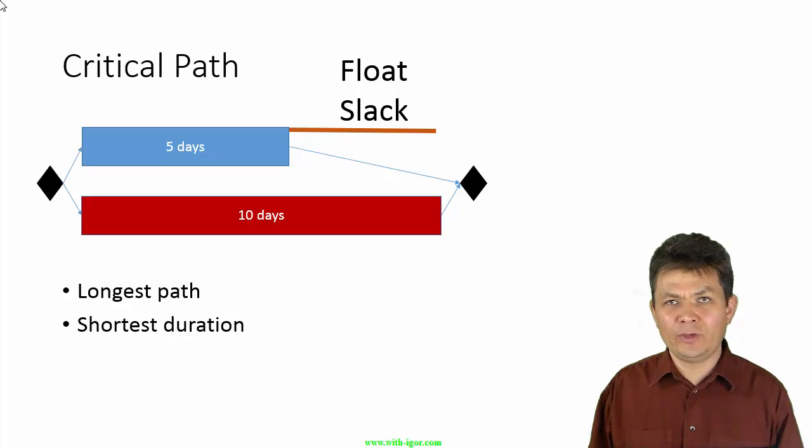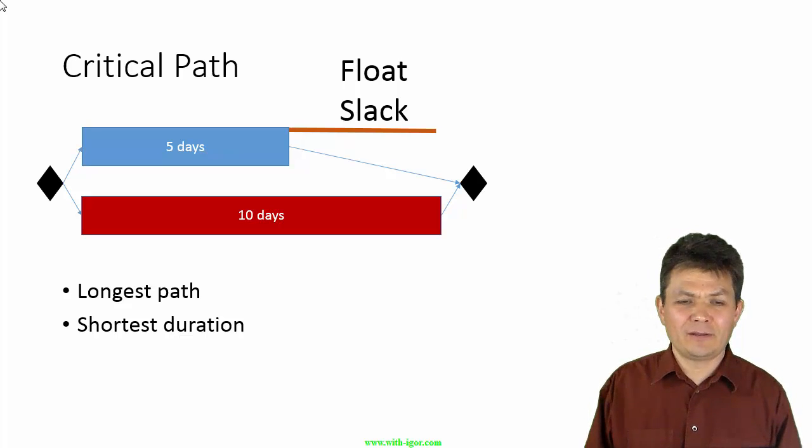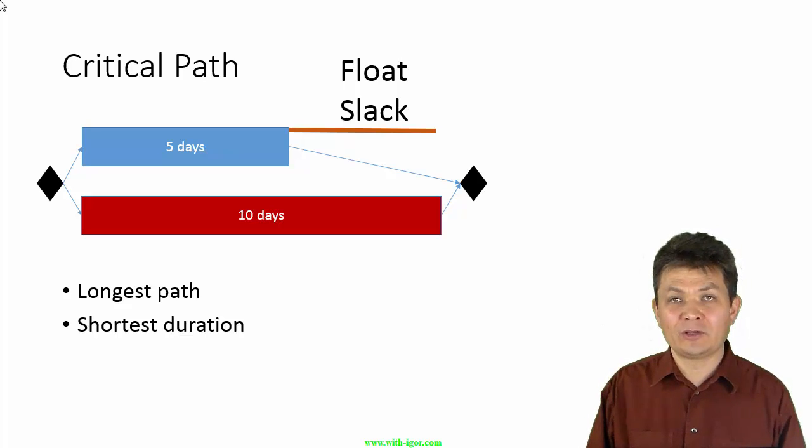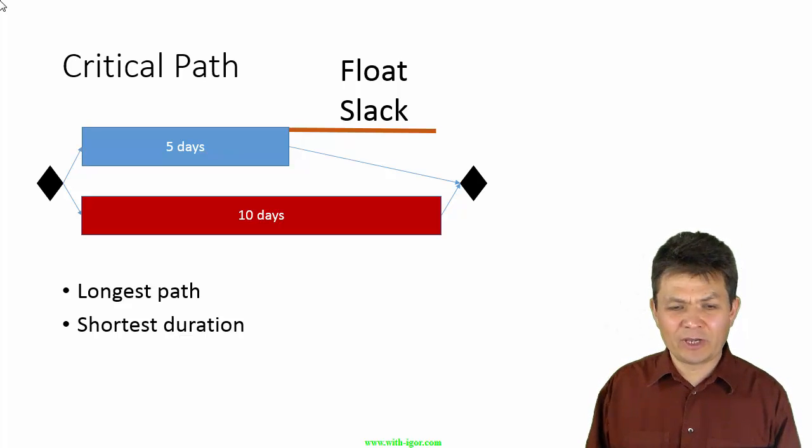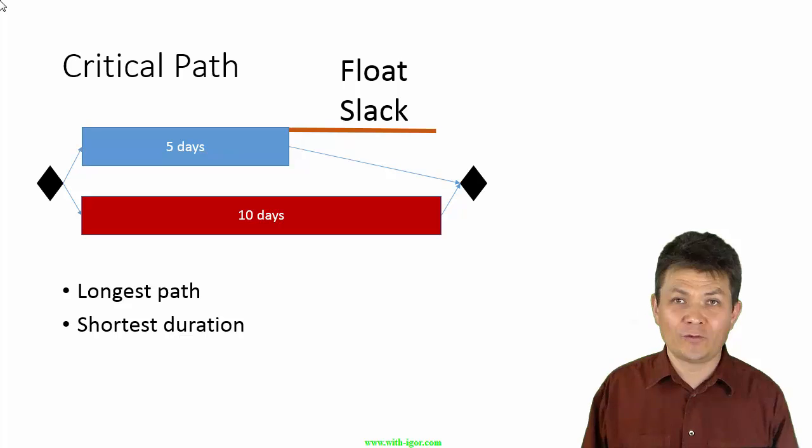However, if they go beyond that, then that task, the 5-day task becoming longer than 10 days, will become critical path. So, float or slack. I guess slack because we can slack off for 5 more days on the blue task.